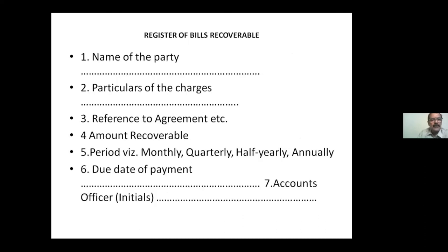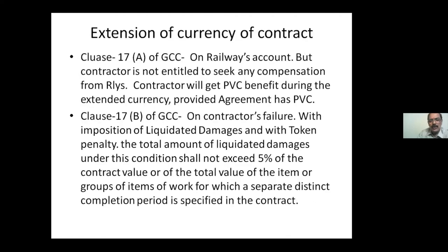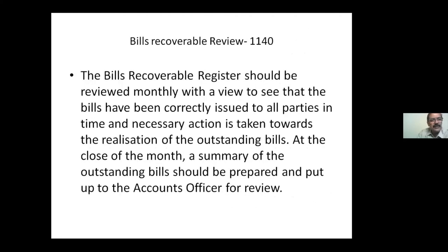The due date of payment and this review: your accounts officer, senior AFR, DFM, whoever it is, will be reviewing once a month. What is the summary of outstanding bills? Now you have sent all the bills, say worth some 5 crores, but you have recovered only 4.5 crores. So the balance 50 lakhs is not recovered. From which party it is pending, that particular review will be done by your accounts officer and action will be taken in consultation with the executive department.